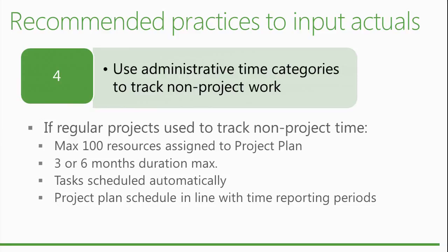So you can use it. By default, it can be either manual or automatically scheduled. That's an option for the project. If you keep it as by default, it's manual. So you will have to switch it back to schedule when you are ready to have the scheduling engine calculating basically the changes made by your updates. And that's pretty much it.